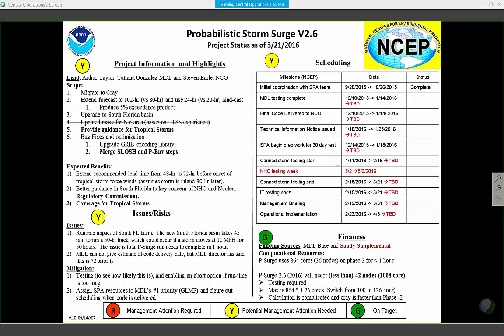We'll see. Yes, I think we can go back to the plan we had last week of combining this with the HSOFS. But I have to check. Because that's what we wanted to do, combine it. The HSOFS is the NOS version of Storm Surge, and they're going to run on all the same storms and all the same test cases. So we wanted to bundle them together and test them all together. If the SPA doing HSOFS hasn't started yet, and we have the code and we review it and it looks good, PSurge can get back on track. If not, we will fit it in as soon as we can, but there are other...